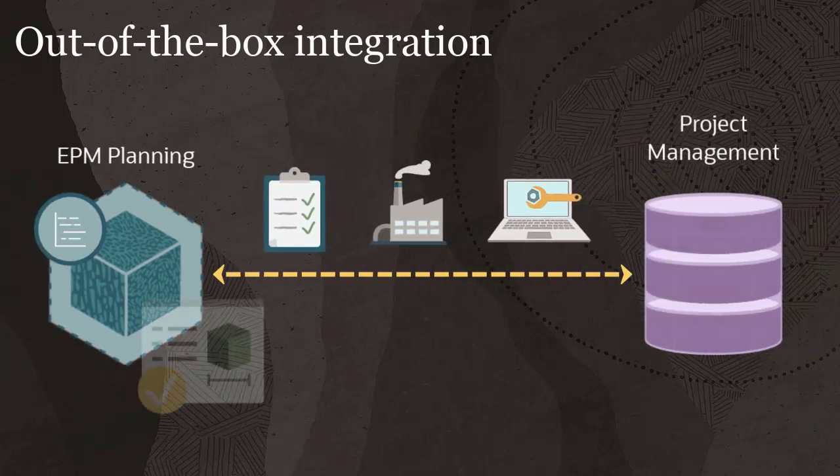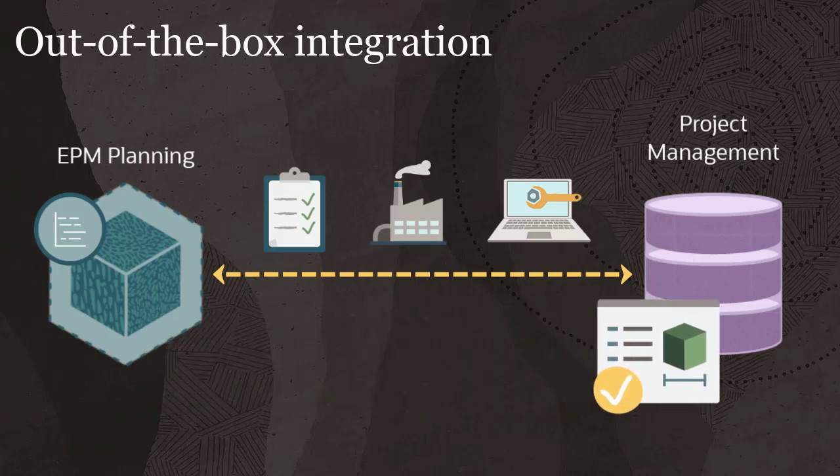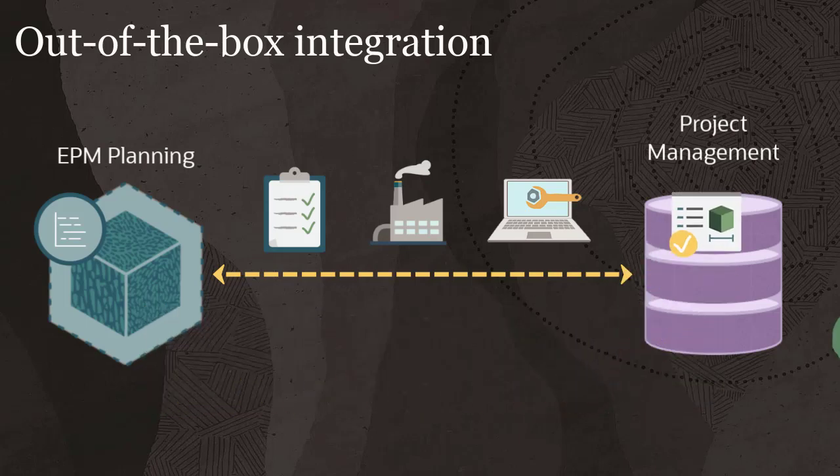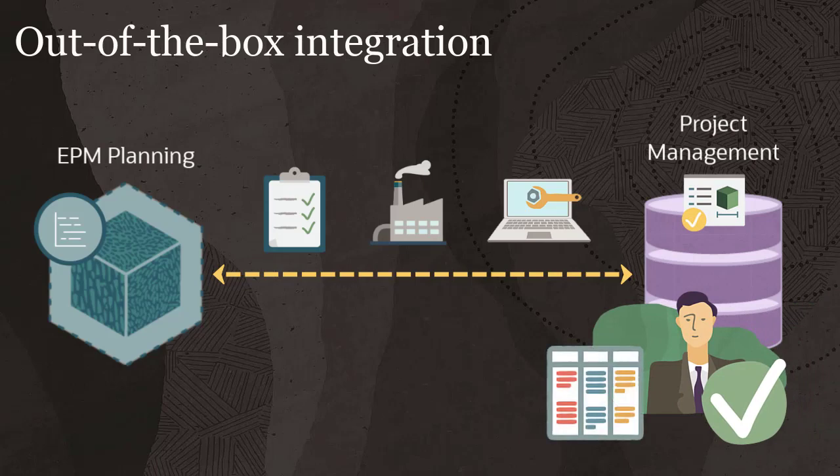After you create and approve projects in the EPM Projects module, send them to Project Management for detailed task-level budgeting and control.